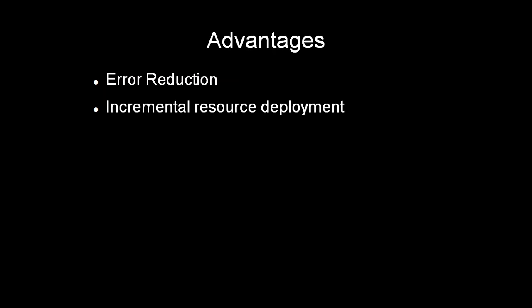So the advantages of this incremental development model is error reduction. Errors can be reduced because the core modules will be delivered initially itself. So the customer will be using the core modules from the beginning itself, from the initial stage itself.